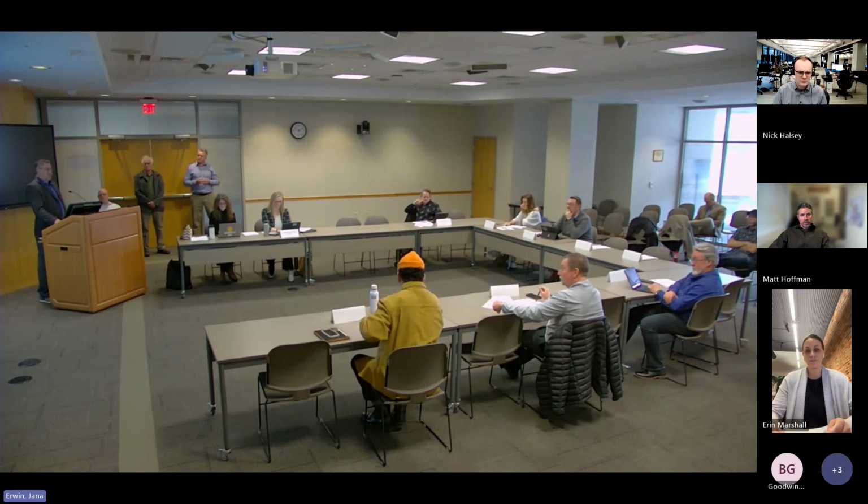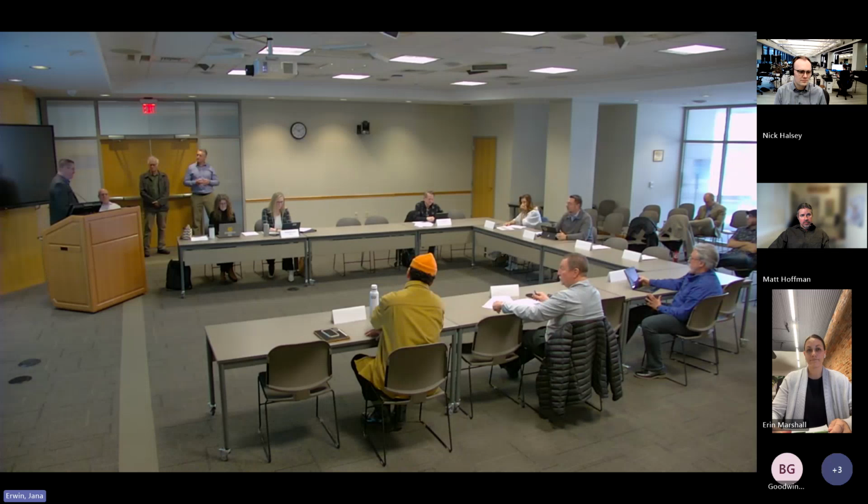Looking back as we worked with Ed for the last 9 months or so, it's been a great experience and a great opportunity. Really excited for him to show off today what they've come up with. We're planning to complete design in the summer of this year, and then bid the project hopefully this fall, with construction beginning in 2026, maybe a little bit of winter 25, and then into 27, as this bridge will take a while to manufacture and build. So with that, I'm going to turn it over to Ed and Craig to go through the bridge. I hope you enjoy what you're about to see.